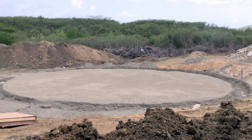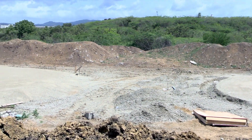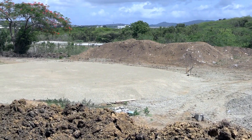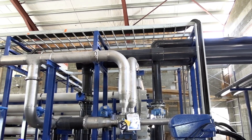I see that you are already doing some work for laying the foundation, literally, for the storage tanks. We want to talk about that, please. Well, what we have done is just to create the pad — complete the groundwork for the pad of those tanks. Now, earlier I mentioned that we have some delays, and that's one of the sources of delays. Unfortunately, due to shipping constraints — and we are all aware of what's going on presently — we suffer from those vagaries. As a consequence, the tanks are about maybe three weeks away from us. The impact that will have on us in terms of storage, yes, but we have already come up with a solution that will not affect our deadline or bottom line of having water produced from this plant towards the end of August.